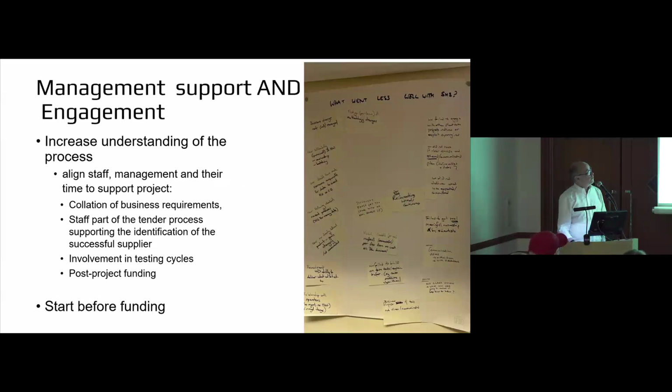We had tried this before, about 5 years previously to this exercise, and it didn't work. We didn't get funding after doing quite a bit of work. And why not? Well, we had support from management, but I don't think we had engagement. And how do you tell the difference? Support is senior managers smile at you and say, hey, jolly good, carry on. Engagement is they look at you and listen, ask you challenging questions, answer emails and show up at meetings when you want them to show up.